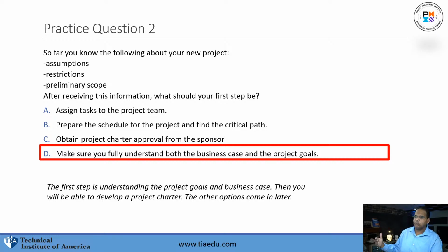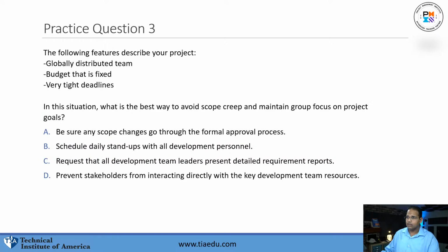So you can't do the project charter until you have done the business case. If you have the preliminary scope, the restrictions, and the assumptions, this is all what you're going to use to develop the project charter, that particular process. So in this particular question, it really tested your knowledge. Do you know that in order to do the project charter, you would have had to do that business case? All right, very good, guys.